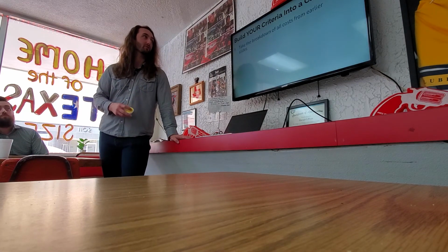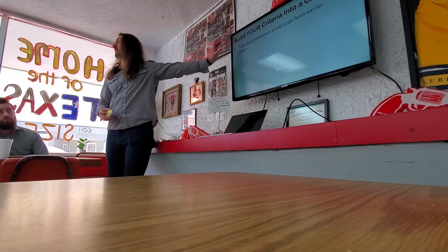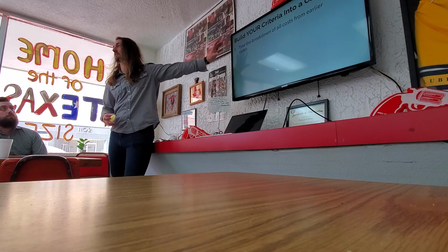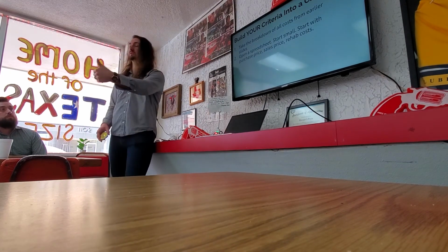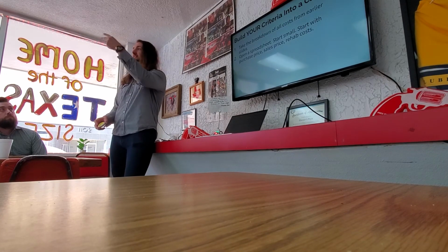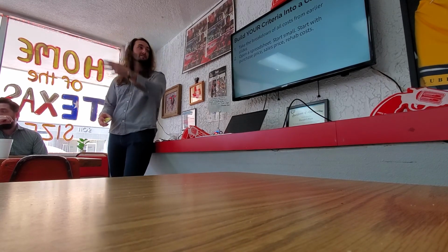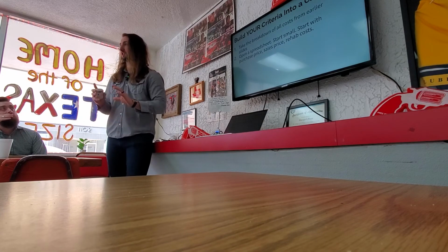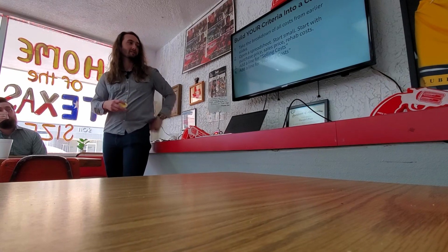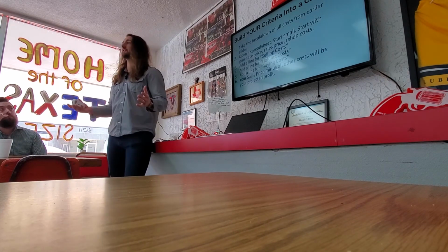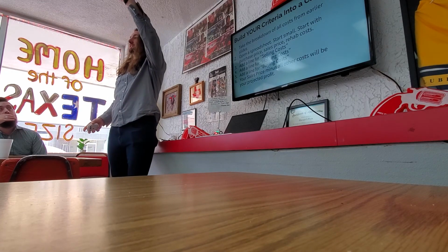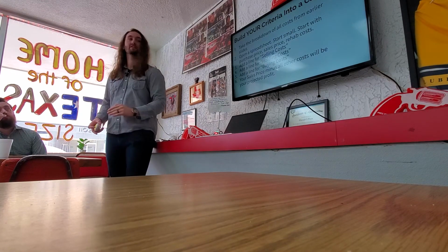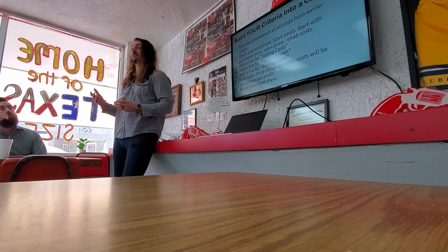So I'll just quickly go through how to build a calculator. Take the breakdown of the costs that we went through earlier. It'll be in this presentation. Open up a spreadsheet, start with the purchase price, the sales price, the repair costs, and your total profit. Start there. From there, add in selling, holding, and buying costs. And the formula is sales price minus all of those other costs equals your profit. Start there.